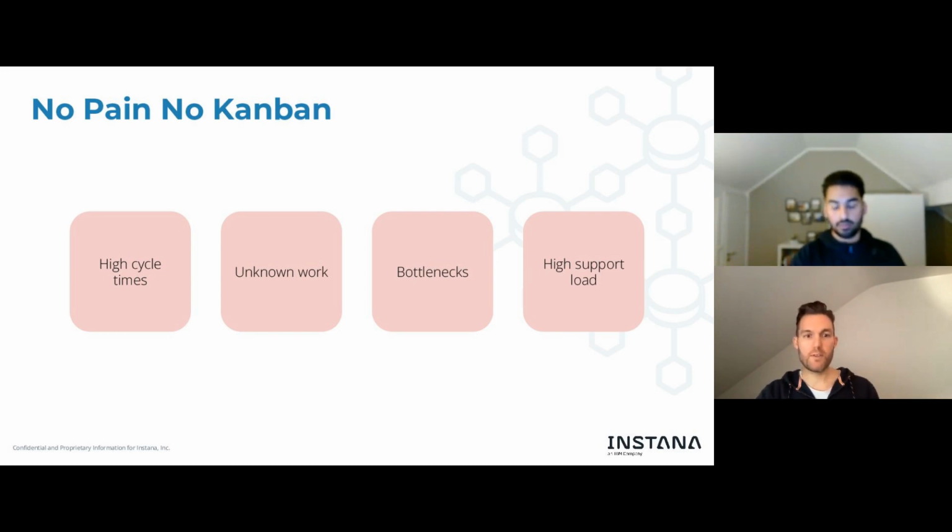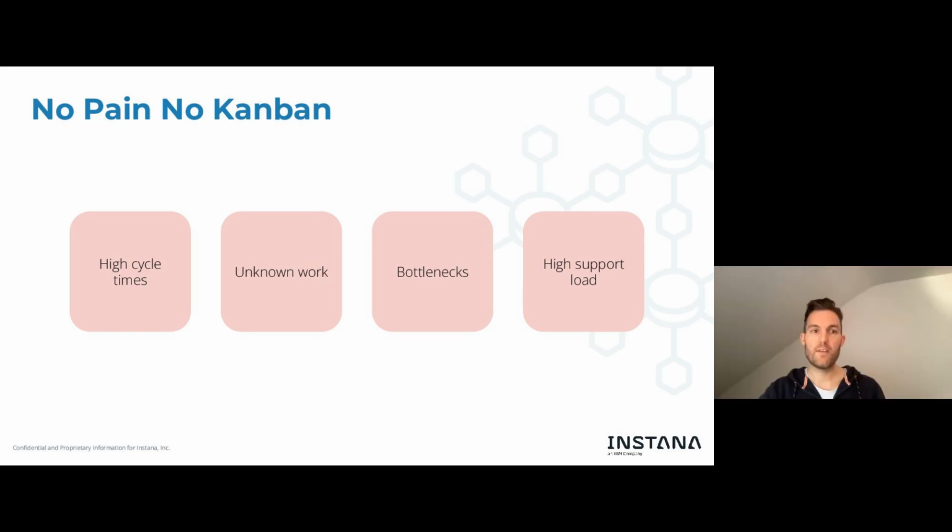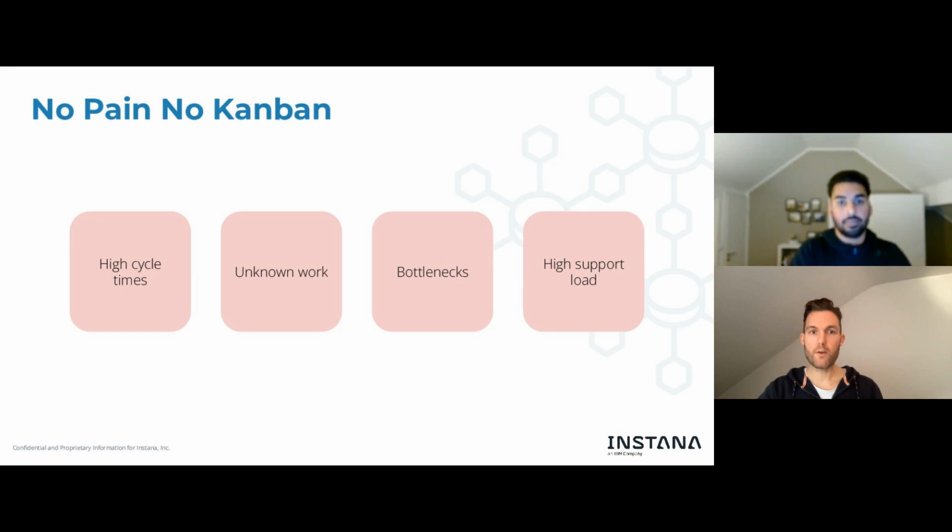Other departments will take care of communicating to the customer. That's at least how we do it. So as long as engineering did not start working on an item, it's still on customer support to communicate to the customer. So there's actually no pressure to do it right now or to begin fast tackling the next issue. This is really focusing on getting things done. So whenever there is no free space for a new item, finish one of the items that is in progress first.